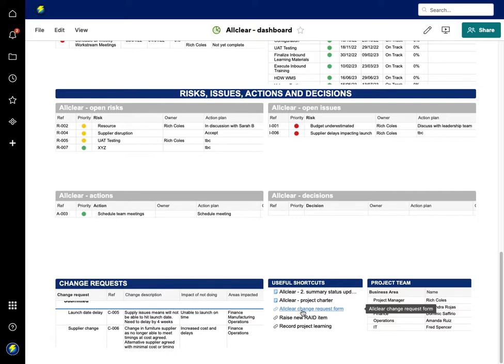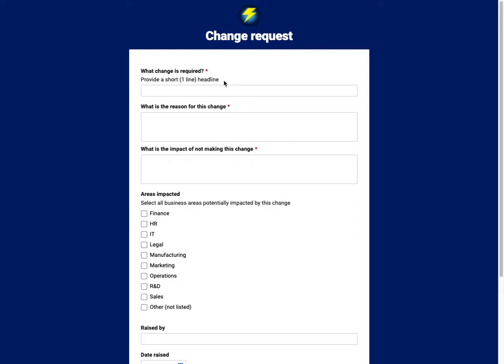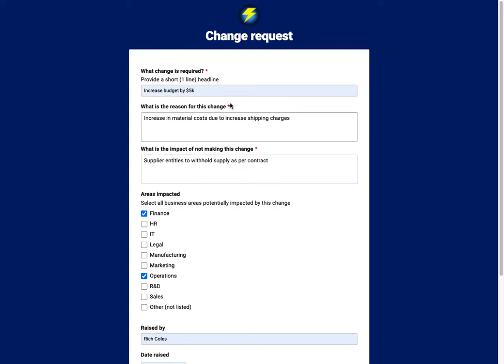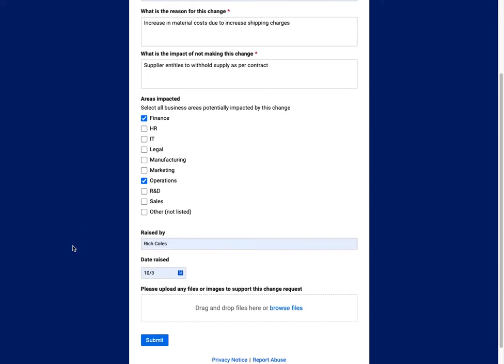The best and most consistent way to get people to fill out the change requests is using a form. Let me just open up the form. Clicking on the link, you can see it's got the various headings which I've pre-prepared. What change is required? What is the reason for this change? What's the impact of not making this change? And then areas impacted—typical headings that you'd have for a change request process.